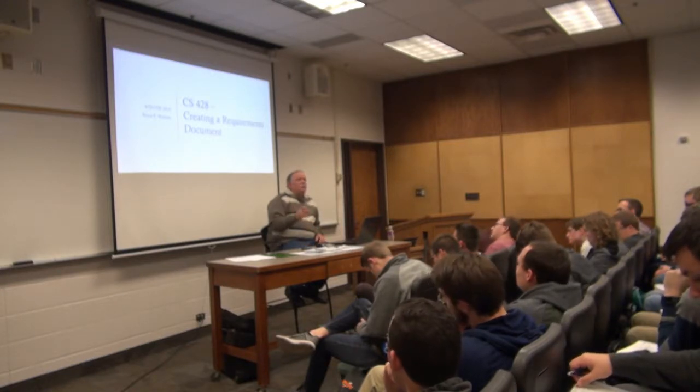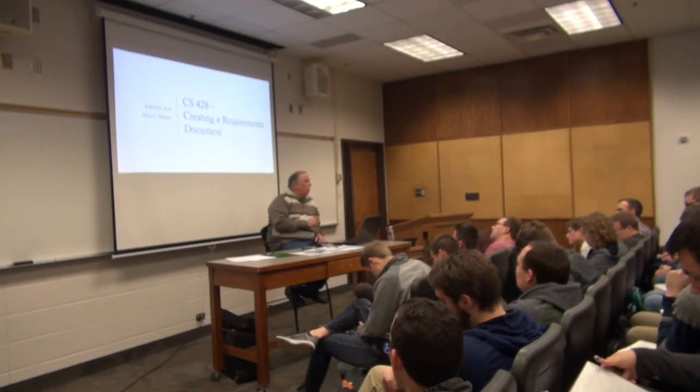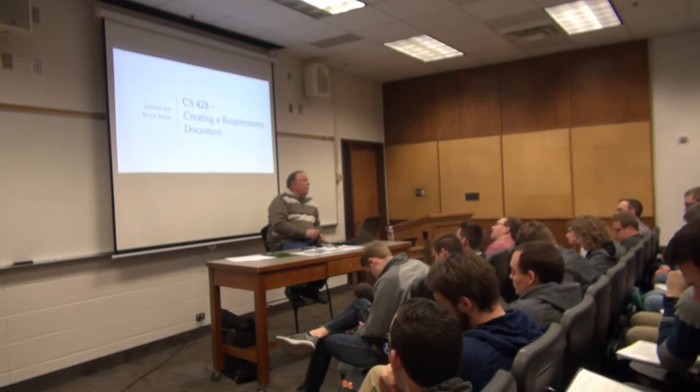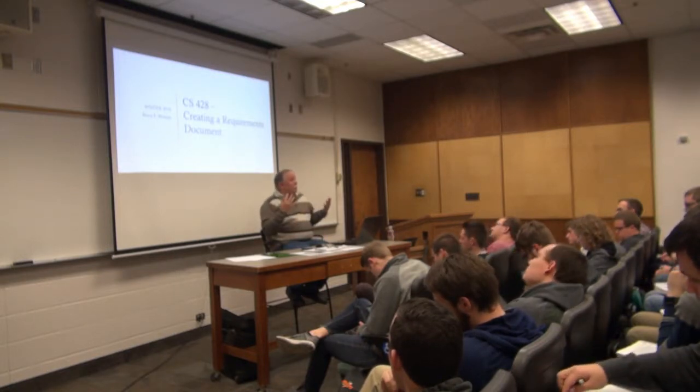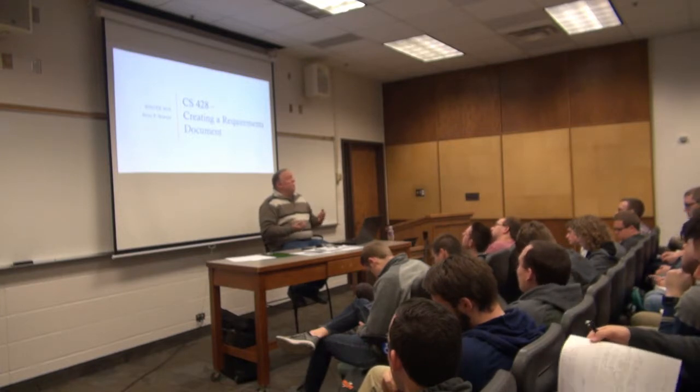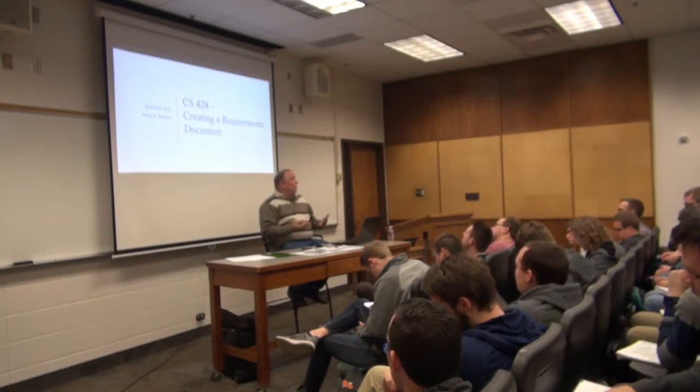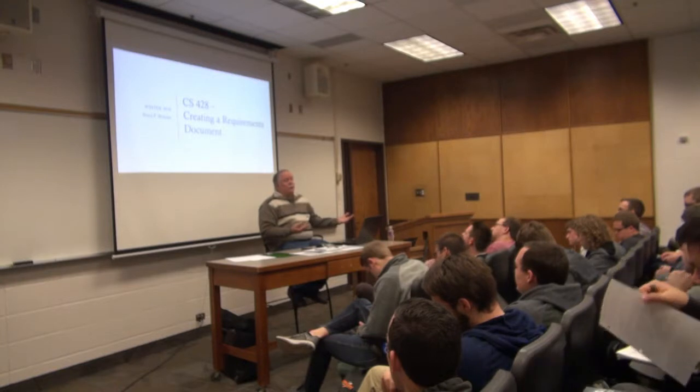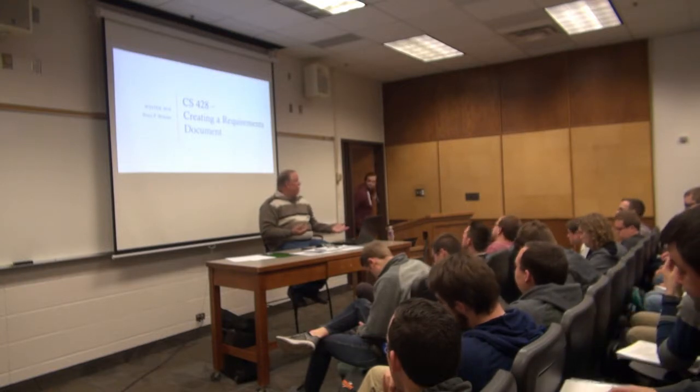Again, in a professional organization, you will have an actual change control board, and we'll talk about this in a future lecture, that will regularly review all the open defects and feature requests and basically say, yes, we're going to fix this one for the next build, or we're going to add this feature for the next build.